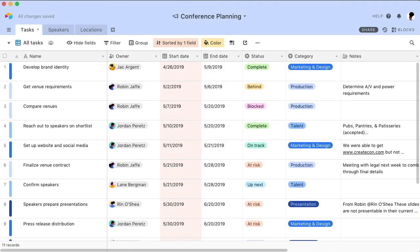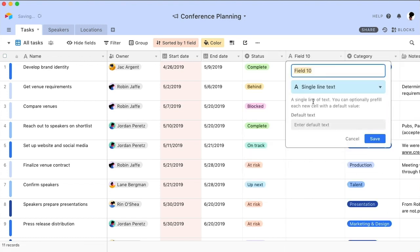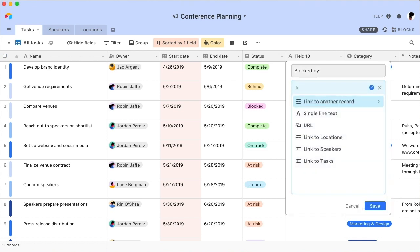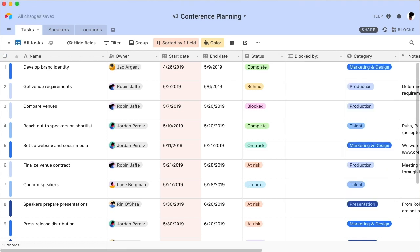If you don't already have a field for dependencies, create a new one. I'll make a new self-linking linked record field for predecessors now and call it Blocked By. Remember, predecessors are tasks that need to be completed before the action or records primary field, and successors are ones that must be completed after.